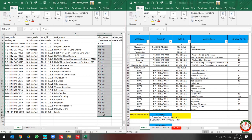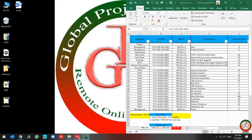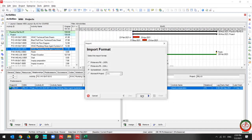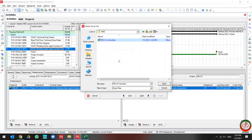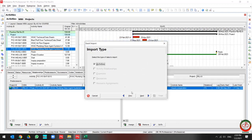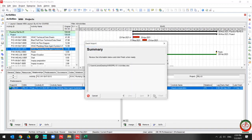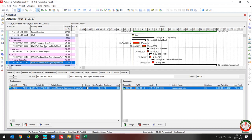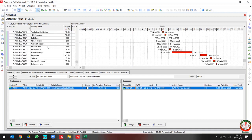You can update the WBS name or you can delete it — it's not necessary. Save it. Come back to P6, go to File, Import, by spreadsheet, find the file, select the file, and choose Activities. Then, as you see, instantly all of my activities are assigned to the proper WBS.